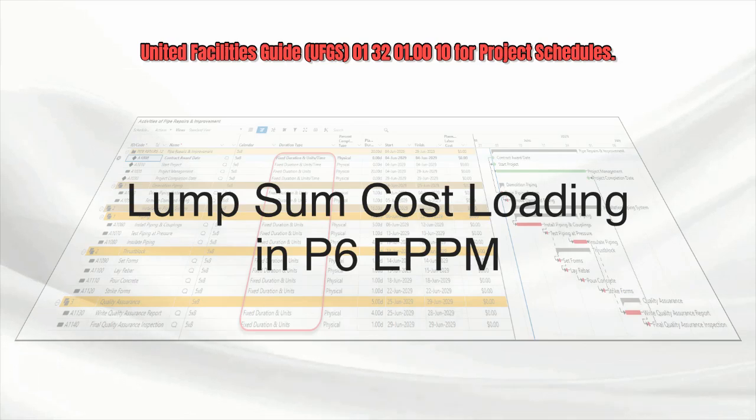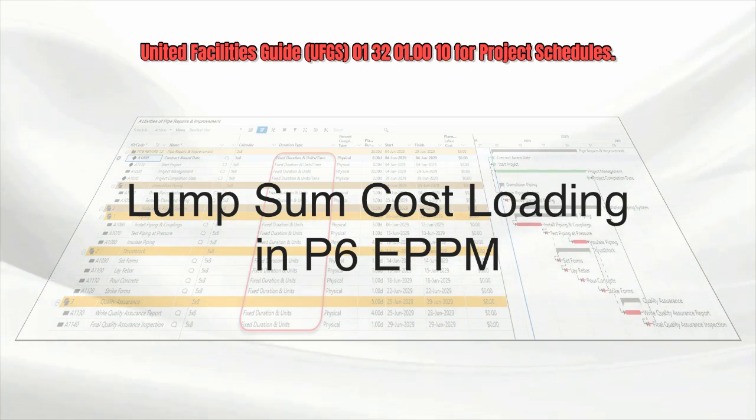The United States Army Corps of Engineers, USACE, has a prescribed way for lump sum cost loading in the schedule. It is a common practice standard for fixed-price resource loading. The Standard Data Exchange Format, SDEF, is a file format created by the USACE in 1986 to allow contractors using different project management tools to share data.